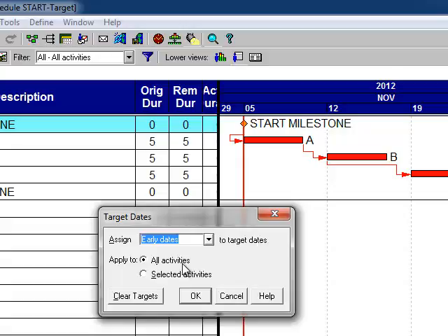So on a real deal, you bid a job, you get it, you submitted a proposal schedule, whatever. Now the owner says you have 30 calendar days to produce a working schedule. In Homework 11, that sewage treatment plant scheduling spec said what? 30 calendar days. That was a monstrous sewage treatment plant, and I asked the engineer from Kiewit when he gave me that, I said, did you really get that schedule built in 30 days? It's not a chance. That took 2.5 to 3 months of back and forth with the client. They finally came up with what I call a baseline, and in SureTrak words, we call it the target schedule.